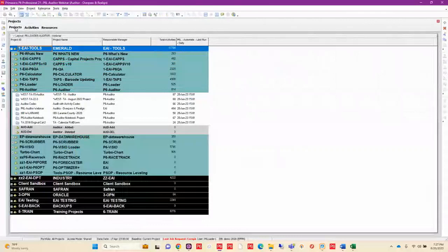Just on that note, in the Oracle Cloud, you're going to have to put a ticket in. Right. And you're going to have to wait. Correct. Yep. And our clients aren't always completely responsive immediately either. That's right. Exactly. They have some sort of ticket timeline. Many of our clients that are in the Oracle Cloud have the loader because we added that auto backup functionality. So not only does it take out the projects, but it takes out the global data, which is the key. Yes. Okay. So you're going to use that to go get the project.